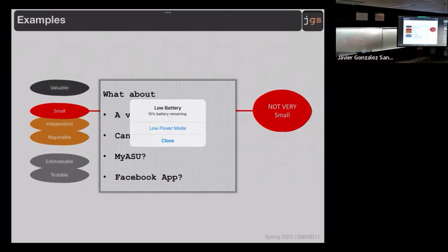Because next I am going to ask you, tell me about the activities for this requirement. And if your requirement or your activities for calculating the score is just one activity, if you have a requirement and you only point out one activity, that is not a requirement. Never, never, never is one requirement going to have just one activity as a detail. Think about this. Your requirement is the name of your algorithm. Never, never, never are you going to have one algorithm that has only one instruction. It's not going to happen. It's not correct.